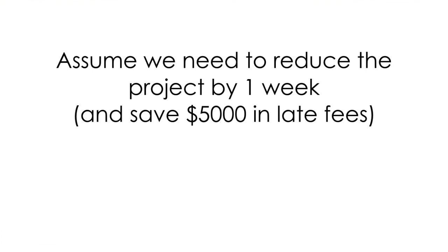Often there are delay penalties associated with the project. For example, we pay a penalty of $5,000 a week if the project's not finished on time. If the project is coming in late, we want to compare the cost of crashing to the delay penalty and make a decision. Optimally crashing a project means finding the optimal or minimum cost duration of the project.